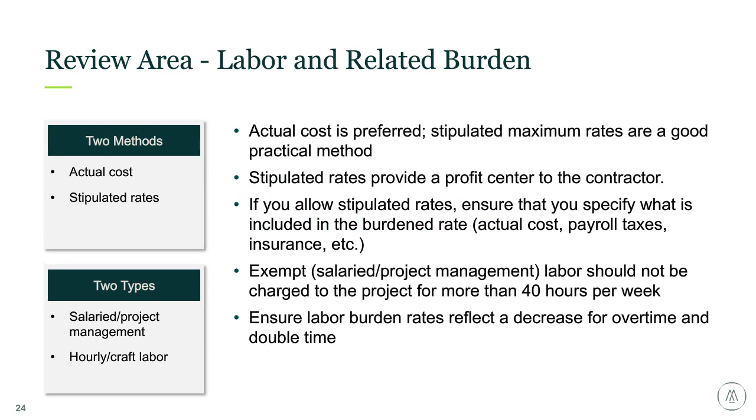Labor burden and related labor. This is one of my favorite areas to talk about. As discussed, labor is a common area of risk. The most common labor methodologies are actual cost and stipulated rates for salaried project management and hourly for craft or field labor.